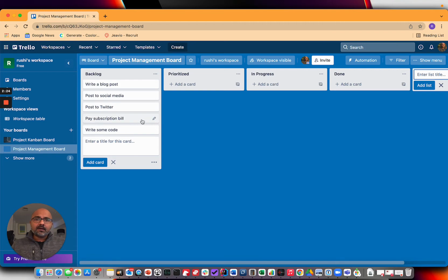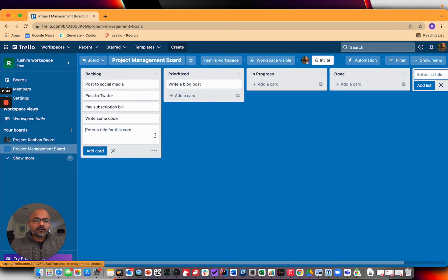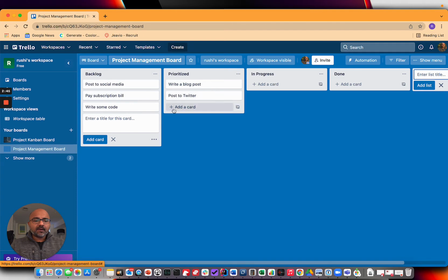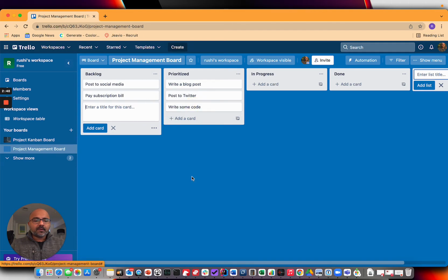Every week there should be a prioritization meeting. In the past, I've done this in the beginning of the week on a Monday morning. The team gets together on a video call or in some sort of meeting, and what we do is we go through and decide what we're going to work on this week. Okay, so let's say we're going to prioritize 3 different things. We're going to write a blog post, we're going to post to Twitter, we're going to write some code. Okay, so these are the priorities. These are the tasks we're going to do this week.